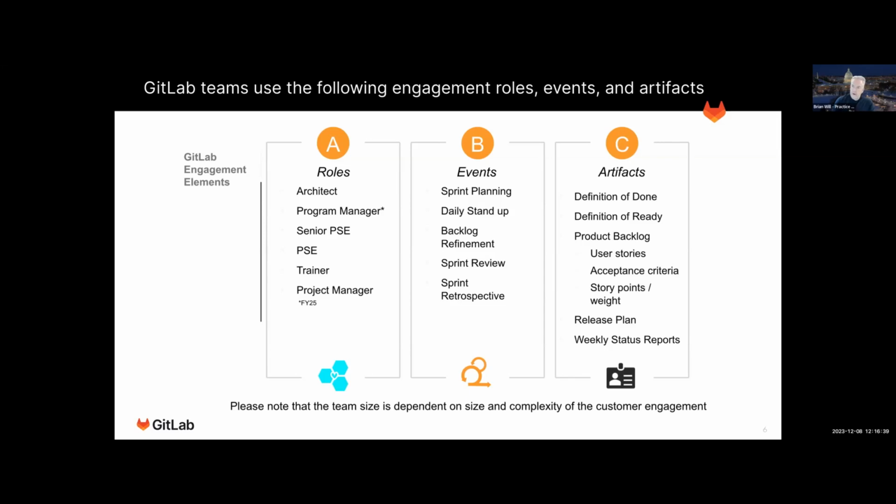Sprint reviews, usually what I recommend, if you have more than 3 sprints, meaning more than 3 to 6 weeks, you want to do sprint reviews to have checkpoints in between while you deliver, to see how well your sprints are going and if you're struggling with obstacles or not. If it's a real small deliverable that you're doing, say 4 weeks, then doing sprint reviews might not make sense. It makes more sense to do a review at the end of the engagement or the end of the deliverable. And then retrospective, same thing.